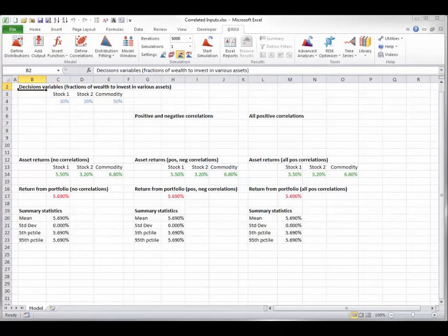If a model has several uncertain inputs and you enter an @RISK function such as RiskNormal in each of their cells, the uncertain inputs are treated as if they are probabilistically independent. However, quantities in the real world are often correlated to some extent, either positively or negatively. If you know that the uncertain inputs are correlated, and you can measure the extent of their correlation, you should account for this correlation in your model by using @RISK's RiskCorrmat function.